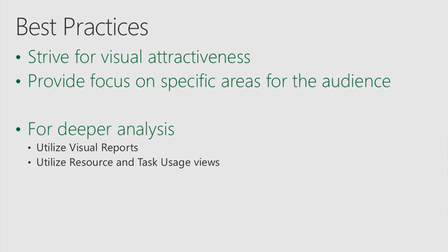So make it short, make it snappy, and focus on the key important things. Milestones, what's due next week? What's happened last week? Where are the issues and risks? What do I need to focus on? On a 40-line project plan or a 5,000 line project plan, you've got to be able to focus quickly into the areas where people are interested.